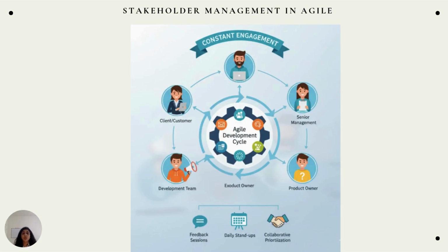In agile, we toss out the heavy documentation and replace it with communication and transparency. Communication and stakeholders go hand in hand. Schedule interactive communication. Stakeholders are actively invited to planning meetings and daily scrums. We purely focus on transparency, inspection, and adaptation. We focus on making information visible to stakeholders so stakeholders can constantly inspect the progress and the team can adapt based on their feedback. For example, the sprint reviews.